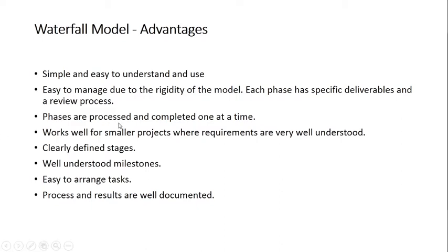Then phases are processed and completed one at a time. Since it is highly sequential in nature, parallel activities are not carried out. At a time a phase is carried out and completed properly, and only then do you proceed to the next phase. It works well for smaller projects where requirements are well understood.